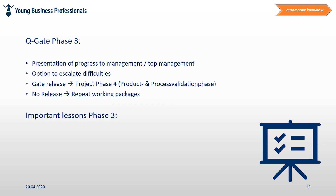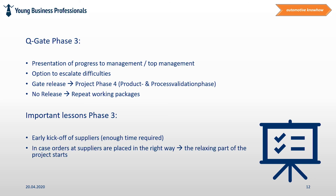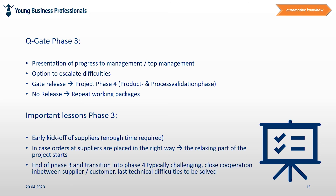What are important learnings of phase 3? Please try to provide as much time as possible to your suppliers to give them the chance to do a proper job with producing the equipment. A result of high quality requires time and resources, and make sure you define the requirements for them as best as possible and in time. In case orders are placed and requirements for suppliers are clear and they are capable, a more relaxing phase of the project starts until the equipment is getting ready. At the end of phase 3 and the transition to phase 4, high attention is required as often a lot of final changes have to be implemented under big time pressure. The better the team was working in phase 1 and 2, the smoother this phase should be running now.